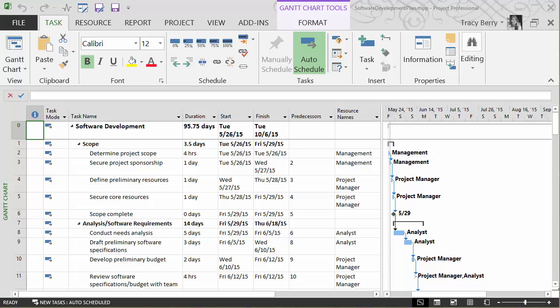It's important to make sure that the project we're working with already has all the elements in place, meaning that all the effort estimates are in, we have all the proper resources properly leveled, and we also have a realistic model of how things should go. Once you have that, we'll go ahead and add our deadlines.